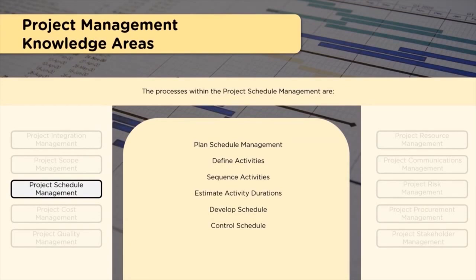duration. Let me assume to deliver X for a person, it requires 1 day, or for a person, it requires 10 days, if we say. So to create that working piece of a product, it takes 10 man days. That is an effort. Now, if I have 100 pieces of such needs to be created, how many man days do I need? So 10 days into 100 pieces, 1000 man days.